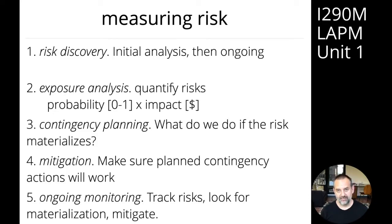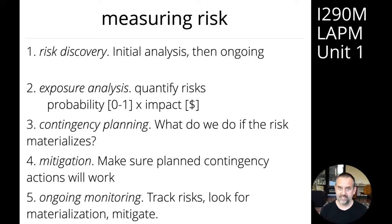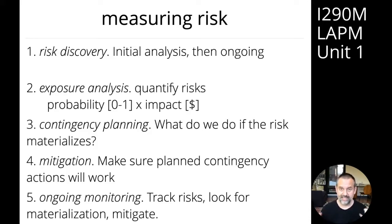You're not going to get that precisely right — you're going to have an estimate — but the crucial part is actually thinking about the assumptions that you make as you estimate the probability and the impact. For risks that we really care about, we'll go and validate those assumptions by running experiments, gathering data, and doing research. You don't need to get those numbers exactly right straight away; we're going to estimate them and then prioritize them.